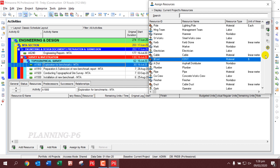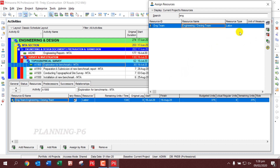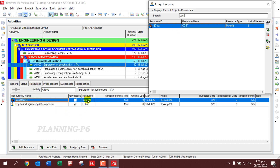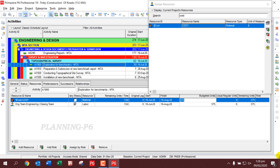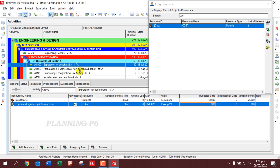For the activity 'Exploration of Benchmarks', we will assign the Engineering and Design Team. Search for the engineering team, then click Assign. For the cost, we assign according to our contract — two resources: one material and one labor. The material cost is twenty-five thousand dollars, and we set the labor units to nine hundred hours.